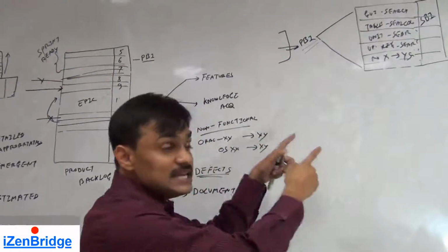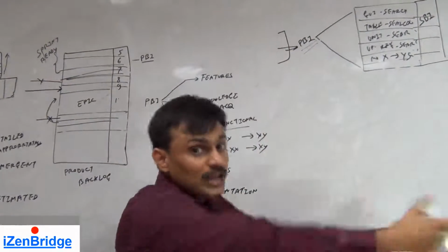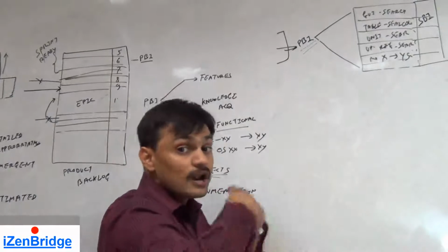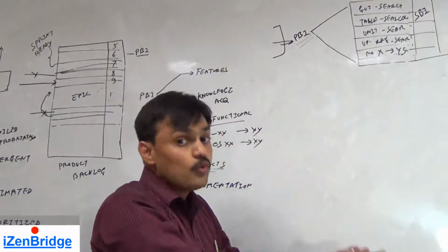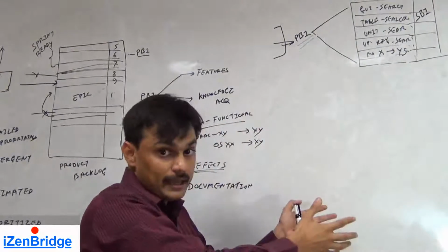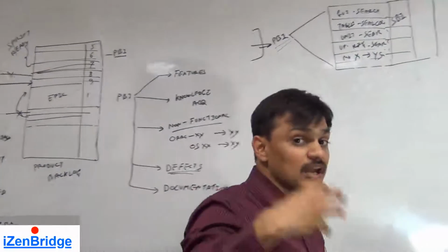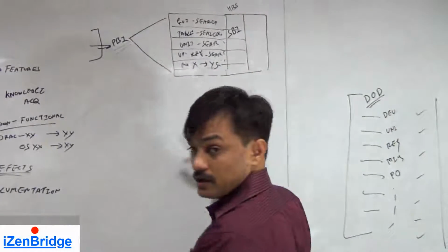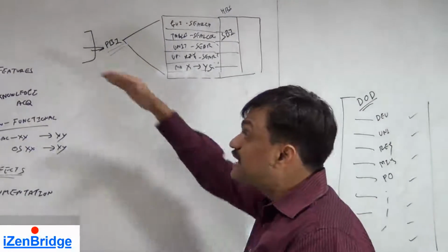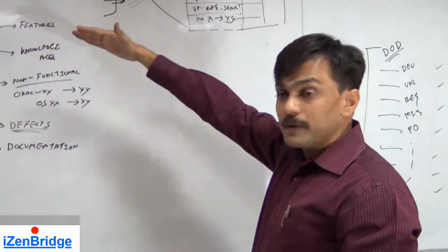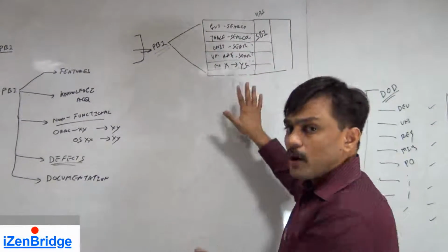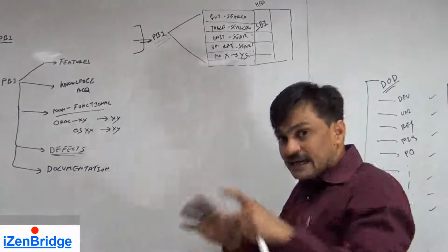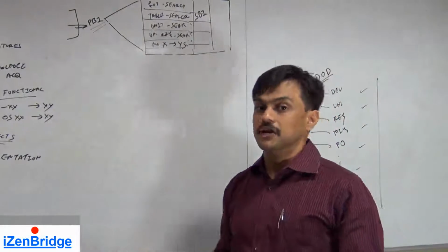But this one is for our rolling wave planning. This one is for our upcoming sprint, which is further detailed at a level where someone can pick and identify how many ideal hours you want to spend on it. Now for a given story in a product backlog item, this estimation may vary. So we will talk about this concept at length in our estimation and planning videos.